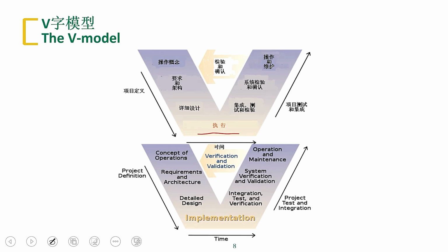Then in the execution phase, we do unit testing, which is code auditing, and gradually generate one module after another. All the modules involved in our software have been completed. Then we have integrated development or integrated testing. If you are not familiar with integrated testing, in domestic projects it's called joint debugging. It's about different departments or modules working together for debugging. The main purpose is clear, which is whether the overall architecture of my software, including the process, can run.